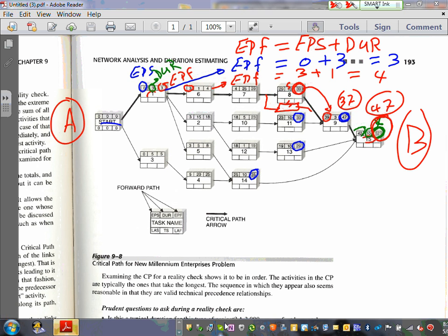The more parallel paths you have, guys, the better. So if you have a task that takes longer than any other task, a good idea for the project manager, and that's what they do all the time, guys, when you're overloaded, is to relieve you. They bring another designer or estimator with you. Why? Because if they don't, two things could happen. You either have to go overtime, and then you have to charge more in some projects, and you could exceed the budget allocated to you, or you have to take longer.